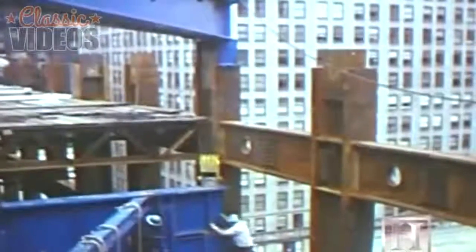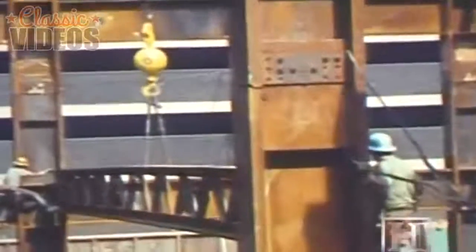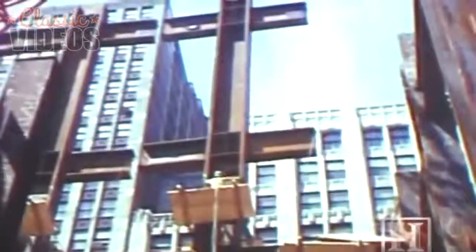Another methodology that was utilized kept the building on target from a timing standpoint. Otherwise, if it had taken you another day a floor, you could see what the difference would have been with regard to the overall schedule. The faster the iron workers set the skeleton of the building, the sooner the other trades could get in. I believe you broke a lot of records for tonnage set in one day. I remember one day when we actually set over 100 truckloads in one day.